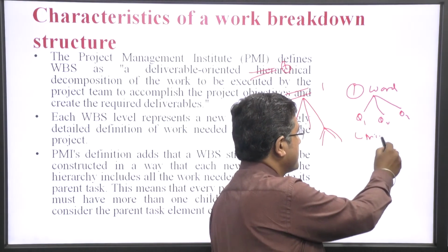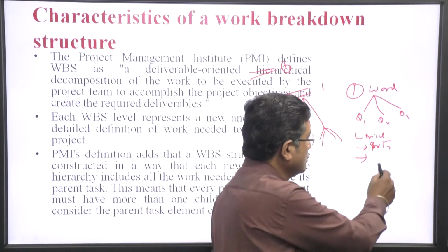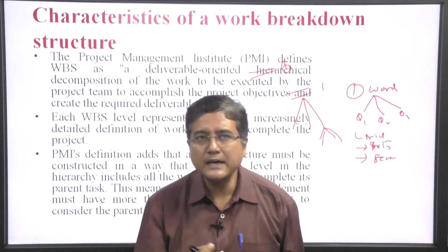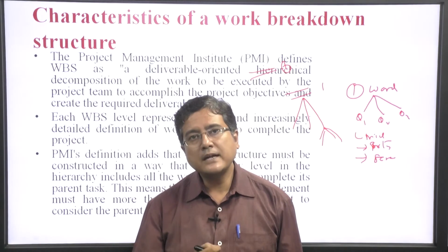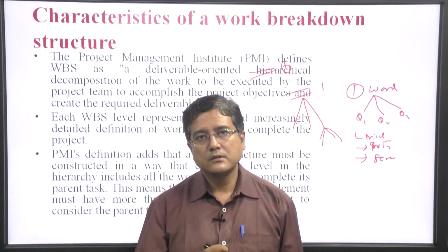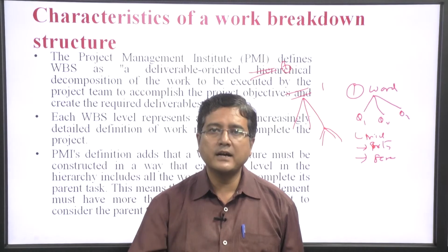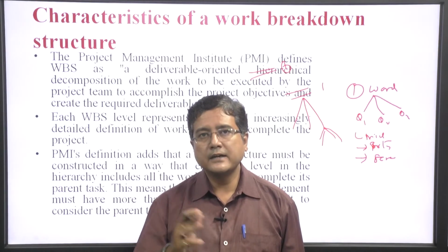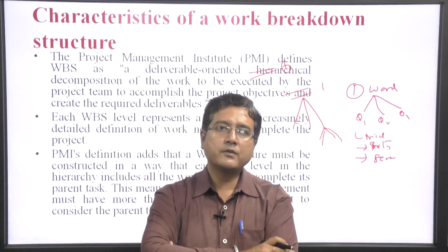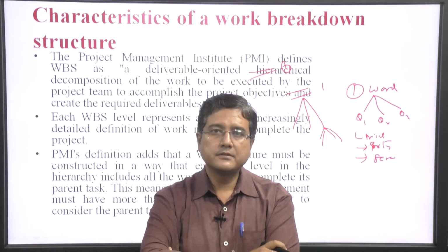Then nails, bolts, screws, cutting machines, cutters. All small items can be broken down. We can define the rate or unit required for the breakdown. For example, a packet of nails is 10 or 15 rupees, and we require about 100 packets, 100 into 50, so 5,000 rupees is in our budget, it is our cost. We require 5,000 rupees of nails, screws, adhesive.